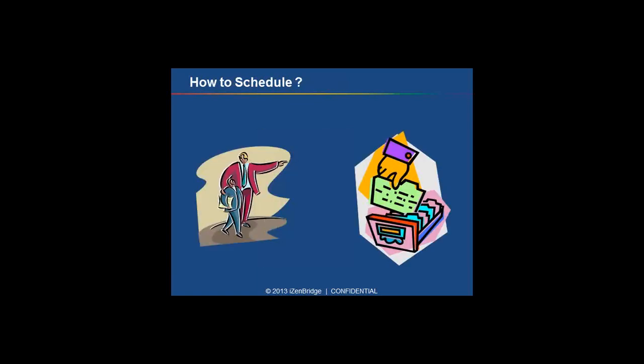Two approaches. Approach one, which we have been following traditionally, is that we have a detailed work instruction. We make a detailed list of activities and provide it to our workforce, saying you have to do this task by this much time. The second possibility could be that we have a list of work visible to them. You can think of a packaging floor where they know that this many orders or goods are there in their inventory. They just need to pack them and start dispatching as they have capacity available. And this is how these two schedulings are a bit different.